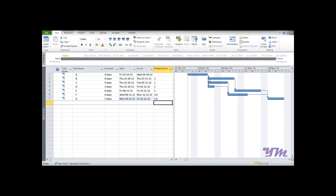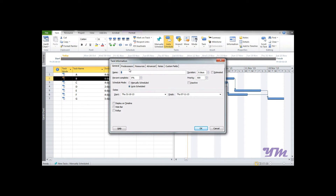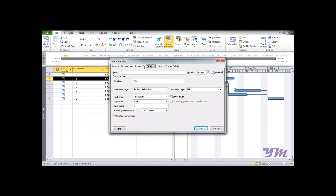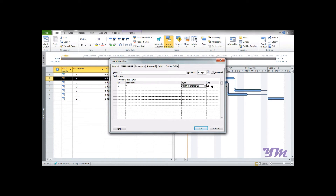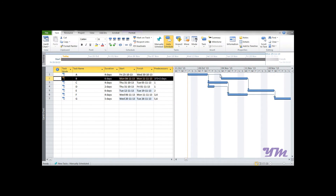To enter a lag, suppose Activity B has a lag of two days after Activity A with a Finish-to-Start relationship. Double-click on the activity row, go to the Predecessors tab, and you can see relationship types: Finish-to-Start, Start-to-Start, Finish-to-Finish, Start-to-Finish. Select Finish-to-Start, then set the lag to two days using the input field or the small adjustment tab, and click OK.